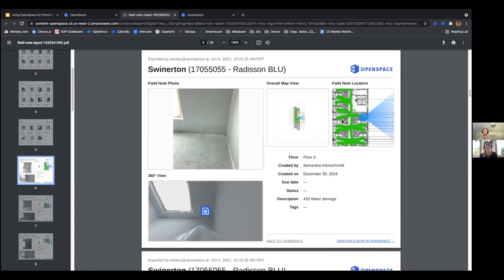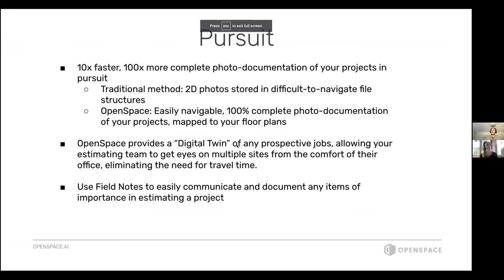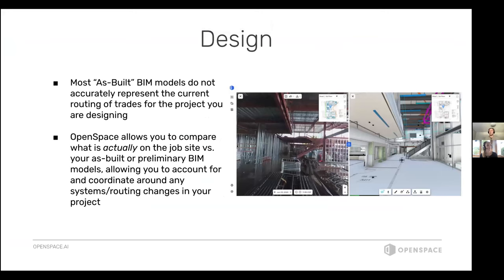Moving on to design — in preliminary design on existing facilities that already have trades installed, the as-built drawings or as-built BIM model you're given often doesn't accurately reflect current routing of all trades and systems. There will typically be cable trays, fire lines, and duct running all over the place that aren't shown in the model. Open Space lets you compare what's actually on the job site versus your as-built or preliminary BIM models.